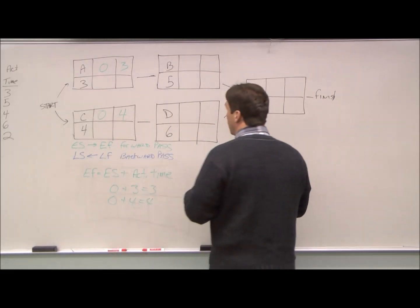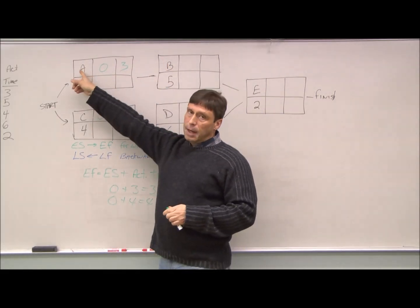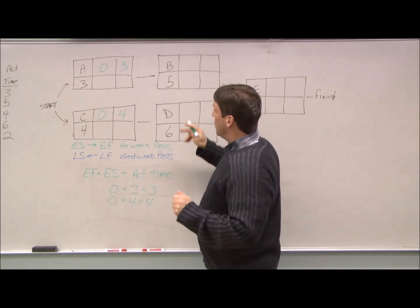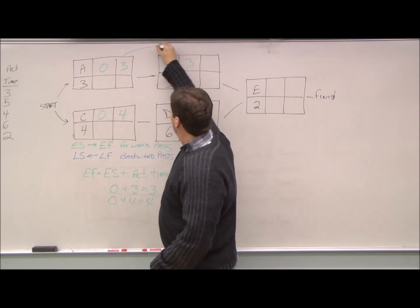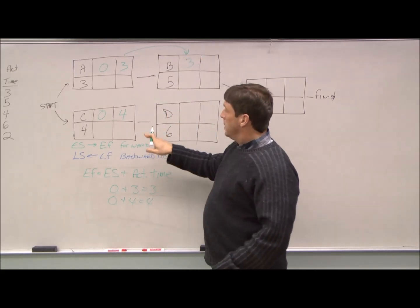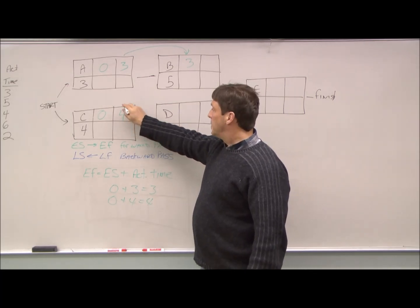Now we move over to our next column. B can't start until A is completed. So the earliest start we can have is week three. Similar with D, D can't start until C is completed.